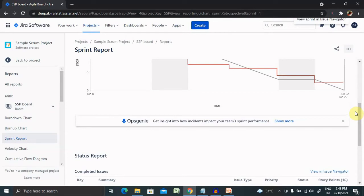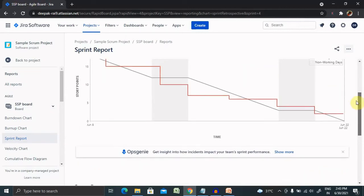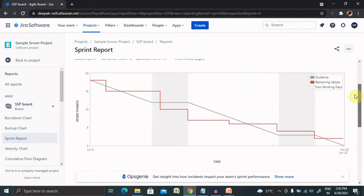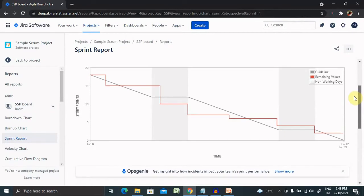Issues added after the sprint starts are included with an asterisk. An issue is considered to do when it is in status mapped to the leftmost column of our board. Similarly, an issue is considered done when it is in status mapped to the rightmost column of our board.